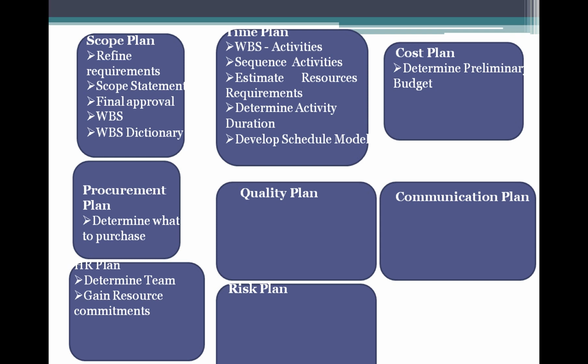So he creates the cost for each activity, and the sum of the costs of those activities gives the cost involved in the work package in the work breakdown structure. The sum of the costs of the work packages gives the total project. Or if there are any control accounts, the project is divided into control accounts,